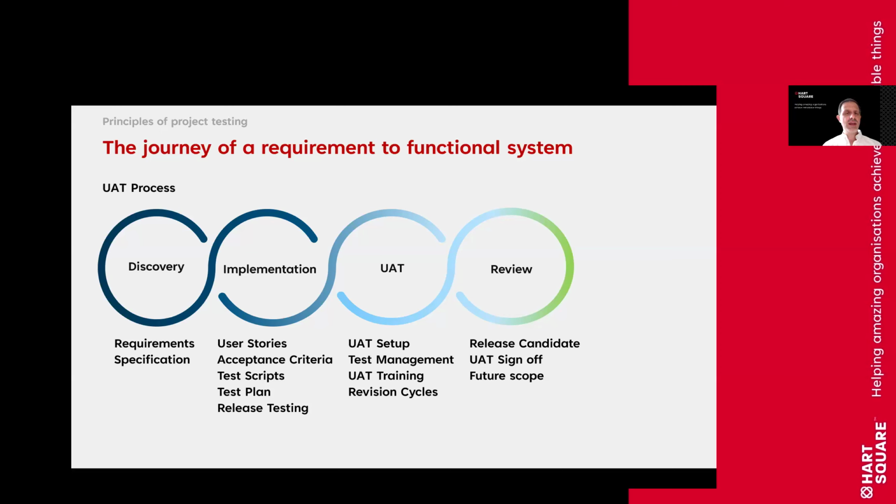Whatever has been agreed that you will go live with at the point of UAT, sometimes things are either seen as not critical or they're too complex to fix in the time frame and they're not important enough, and they might be de-scoped or might be pushed into a later stage. I did want to talk very briefly about a release candidate.